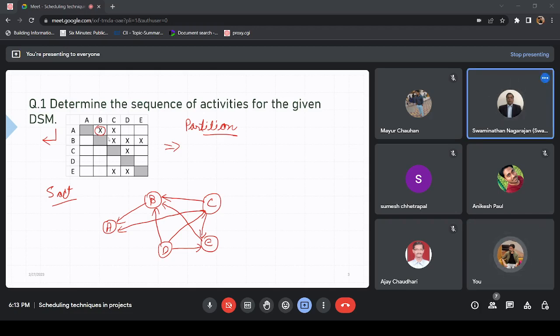So, are you saying something? Okay. So, giving information can be considered as a finish start relationship. Like B is finishing and giving some information that B is finished. So let's proceed with A. Now let's try to bring it in some sequence. So can we do it? It looks like quite varied. We can't determine what's the starting or what's the end point till we remove one of the arrows.